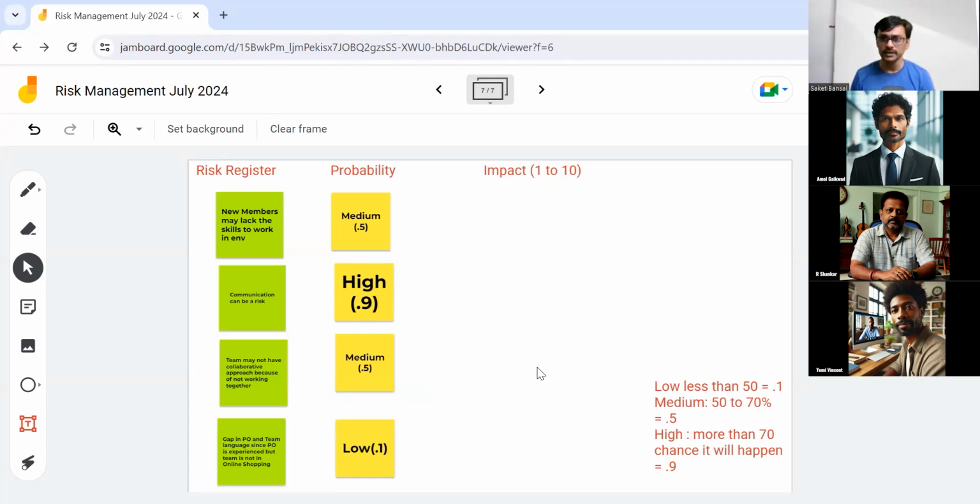And we are doing a step in the assessment of the risk. Usually all of this is put in a risk register. So we are elaborating the risk register by adding probability and impact.